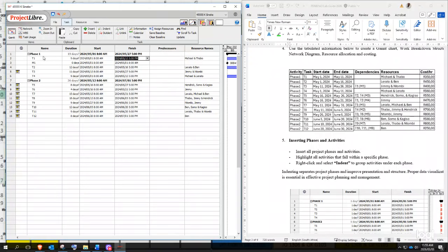So milestone number 1 depends on T1. So what is the finish time of T1? Remember I said T1, for instance, we could say it is developing a business plan, and then milestone 1 is your business plan getting approved. So when was the business plan done? We started compiling a business plan on the 1st of May. We finished on the 13th of May. So when did you reach the milestone of developing a business plan? On the 13th of May. So that's when the business plan was approved, because I had completed it.